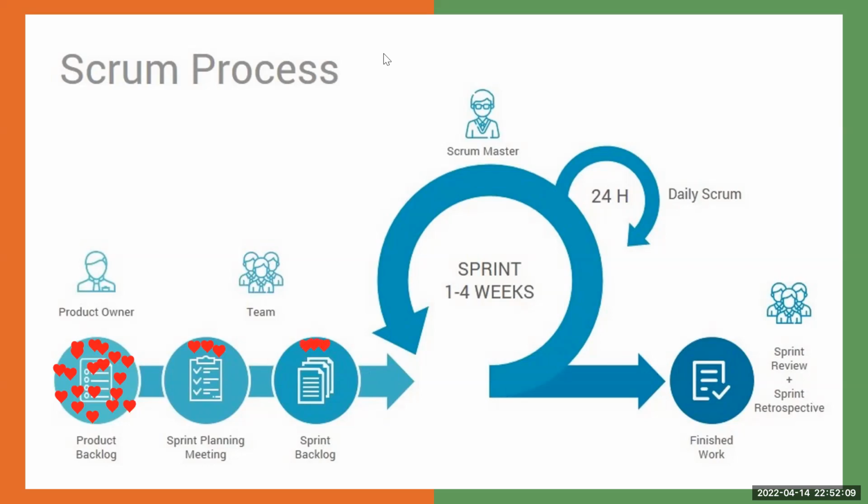Let's just say our 3 things that we're going to focus on during this sprint are the contact page, credentials, and, I don't know, social media links. That's all we're going to focus on for these 4 weeks. Those components of the website, we are not focusing on everything else during this time. We're focusing on these 3 things only. That gives us the focus to really just dial in on what needs to get done this iteration. That's the difference between the 2.